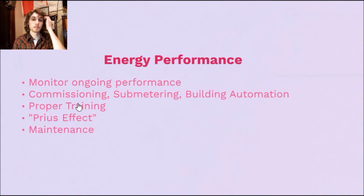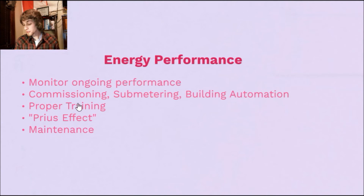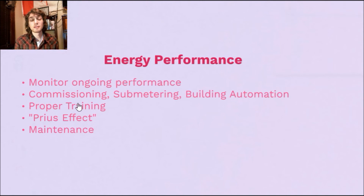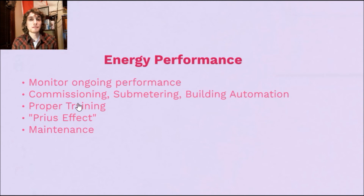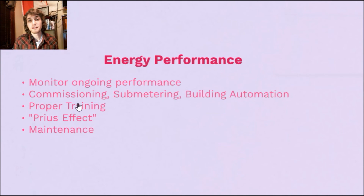This is where our commissioning, submetering, and building automation come in, and we compare that to our baselines. We prepare the owner's project requirements — basically the decisions and project goals that were set — incorporate benchmarking, monitor the progress, and train building employees and managers to operate in this new sustainable environment for ongoing progress and maintenance. We also have something called the Prius effect, where people perform better when they see the positive impact they're having — when they see their savings in costs and reduced environmental impact, they're encouraged to do more. Finally, we want to keep up on yearly maintenance and monitor our infrastructure to avoid issues like thermal leakage.